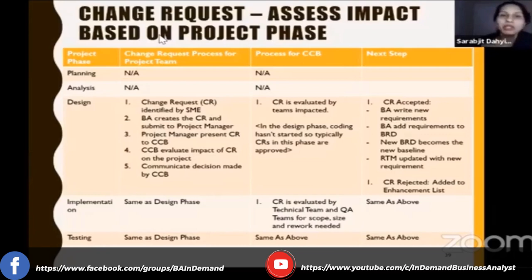So the reason we have to go back in the waterfall environment to assess changes in time, scope, and budget is because everybody has spent so much time in each of the phases to write out the requirements, right? So if a new change comes back, all teams that have worked on those requirements have to go back and understand what that impact is, right?